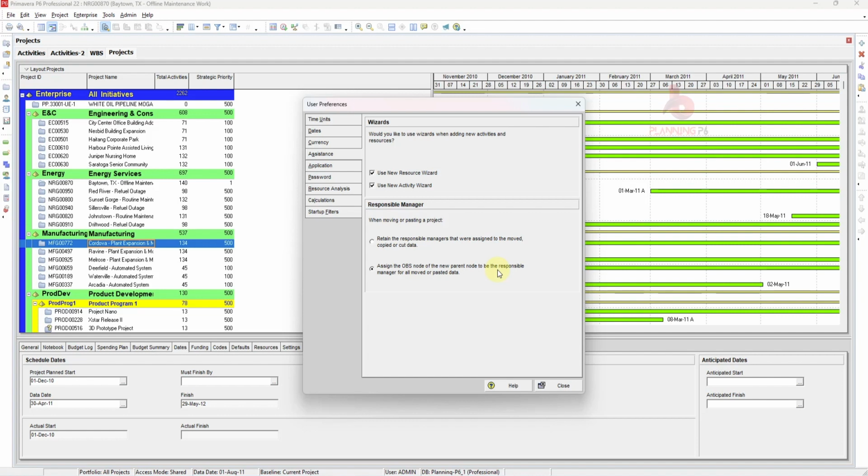These fields are also available as columns for the resource assignment separately. The calculation used for these fields takes into account the earned value technique in use for the WBS of the assignment's activity, whether a resource curve is applied to the assignment, the calendar assigned to the resource or activity, and the percent complete type of the activity, where the relevant project data is calculated live and not stored in the database. So they have earned value for the assignment.